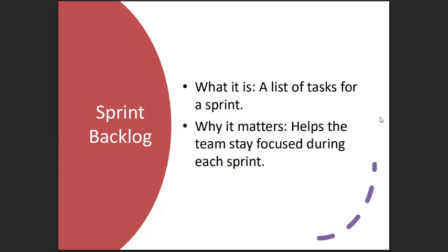You begin your daily stand-up as well again. After the end of the second sprint, you do another sprint demo or review meeting. You organize the team members for each of these meetings as you track across the different days of delivering this particular sprint. So you track per day by your daily stand-ups, 15-minute stand-ups. And this is how you stay on track as a Scrum Master or a project manager in this case.